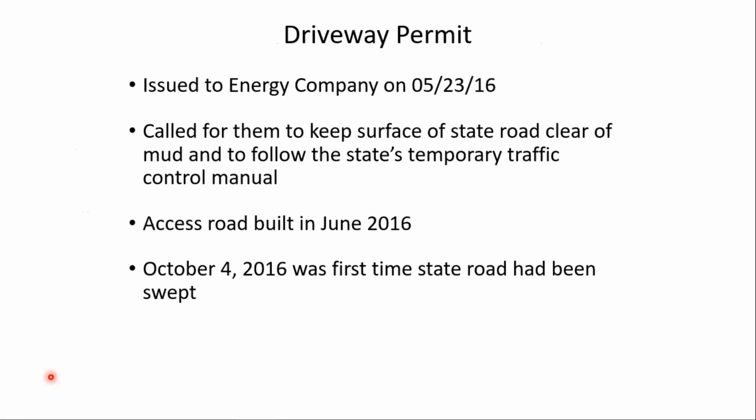The driveway permit was issued to the energy company in May of that year. Remember, this crash happened in October. It called for them to keep the surface of the state road clear of mud and to follow the state's temporary traffic control manual, which governed short-term work like that, or mobile work, I guess you'd call that, with the skid steer on the roadway. The access road to the well pad was built in June, about a month after the driveway permit was issued. And October 4th, the date of the crash, was the first time the state road had been swept.